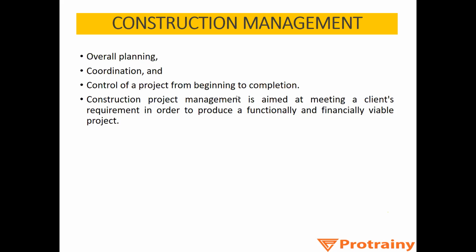But instead of that, because the team was very poor in management and in technical aspects, they saw that ambiguity on the last day when they were going to start the work. So for 15 days the work was stopped at site, labor was sitting idle, machines were sitting idle. You were paying salary for all your engineers, and all the equipment was idle, but you had to pay the rent. All these things happened, but the work was not performed. Why? Just because you couldn't see that ambiguity beforehand. So all these things tell you about how the construction management team is.